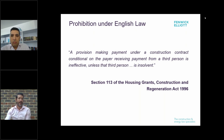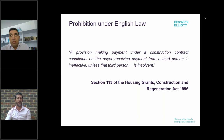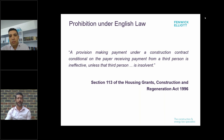Under section 113 the subcontractor has the ability to force the contractor's hand. Another situation the Act seeks to avoid is where a subcontractor has completed its scope of work, submitted its payment applications and received a certificate confirming the sum it's entitled to, but a dispute has developed between the main contractor and the employer — a dispute having nothing to do with the subcontractor — that has caused the employer to suspend payment generally. That dispute could take many months to resolve. Section 113 stops a subcontractor from having to wait and potentially risk insolvency because of a dispute that has nothing to do with it.